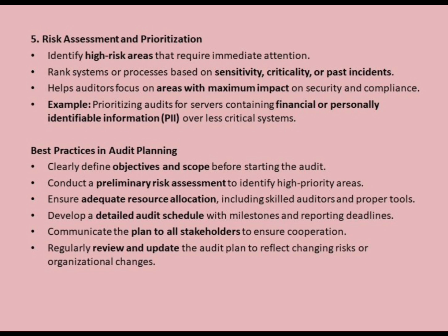Example: if a company stores both financial records and internal employee communications, auditors would prioritize reviewing servers that hold financial data or personally identifiable information, PII, because a compromise there could result in regulatory fines or major financial loss. Less critical systems, like public-facing informational websites, may be scheduled for later or receive lighter auditing.